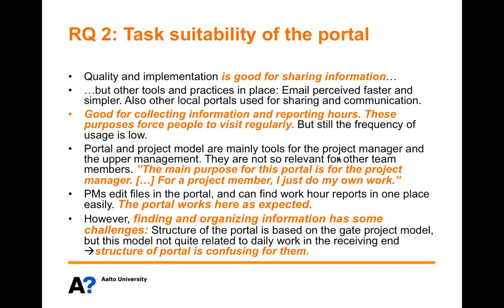And the portal and the project model in this case were mainly seen as a tool for the project manager and the upper management, and they were not so relevant for other team members' daily work. For example, there's one quote: the main purpose for this portal is for the project manager. For a project member, I just do my own work. And this creates some challenges in how to support the implementation of these kinds of tools, because the motivation or the understanding of the people of the project model can be limited.